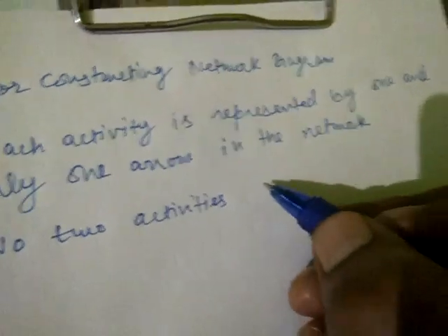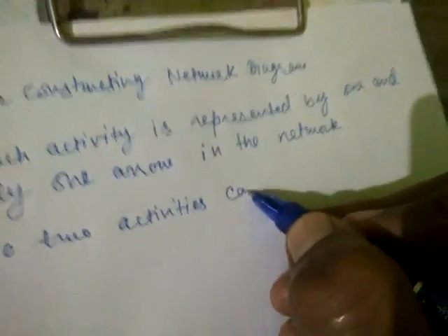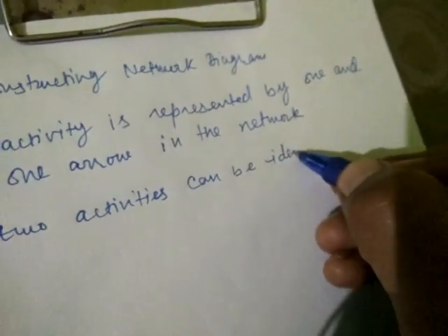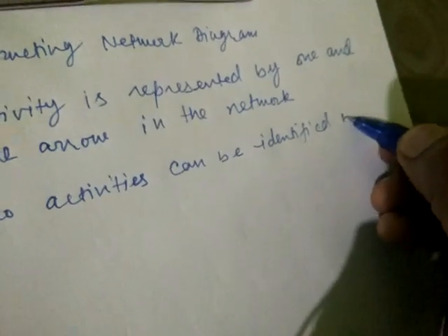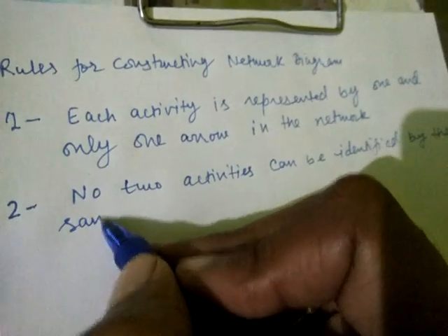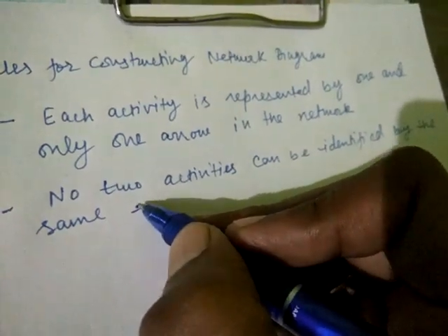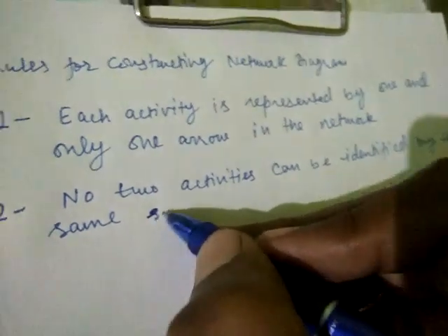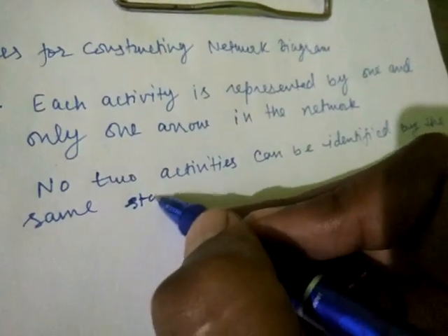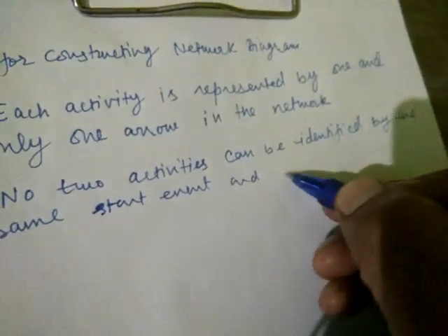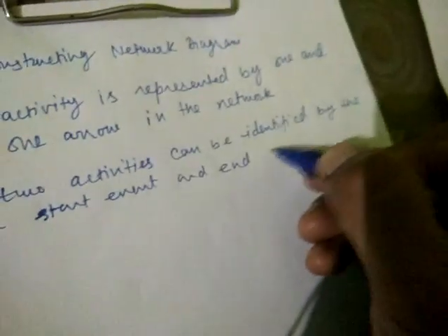No two activities can be identified by the same start event and end event.